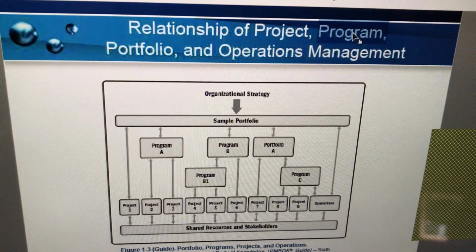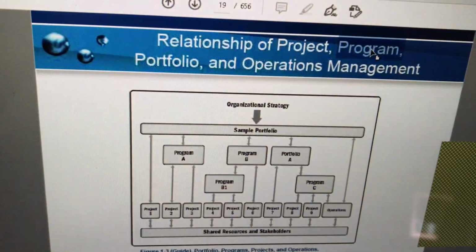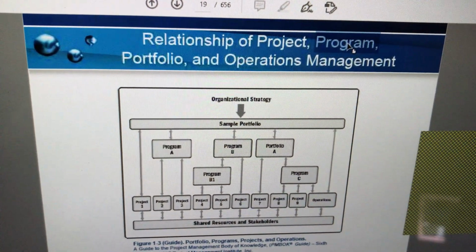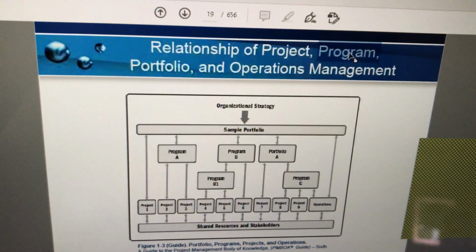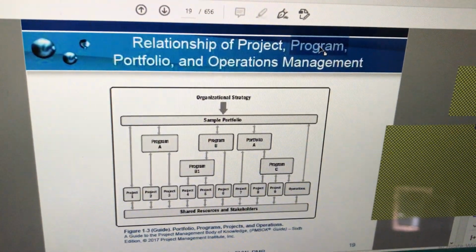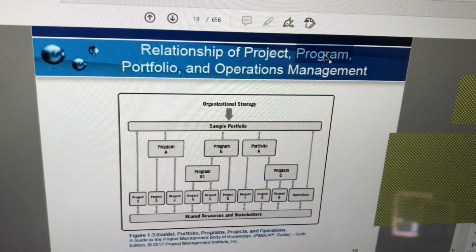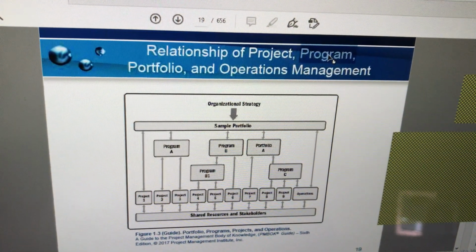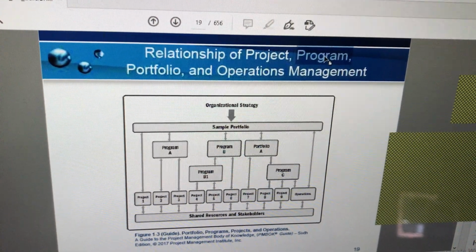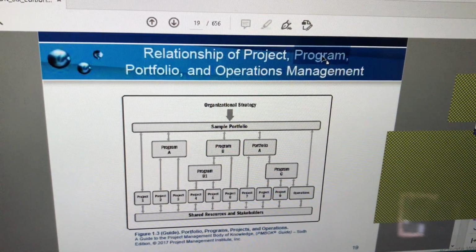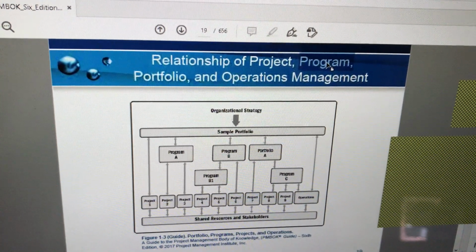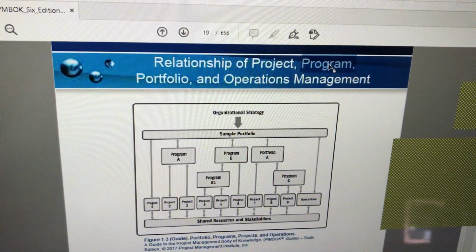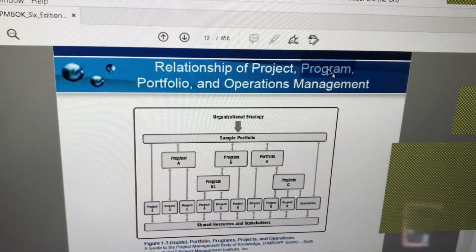Now what happens if these two projects are managed as a program? That means both the project managers are reporting into a program manager. If you are the program manager, will you allow the Indonesia team to go for an IBM product and Vietnam to go for a TCS product? What will you say? Hey, let's standardize on one particular vendor, one particular software. Let's negotiate. Let's hard bargain. You may choose either IBM or TCS, but the total price will be what? You might do it at the total price of 1.2 for both the geographies, isn't it? Do you see how much you save when you do it as a program manager?